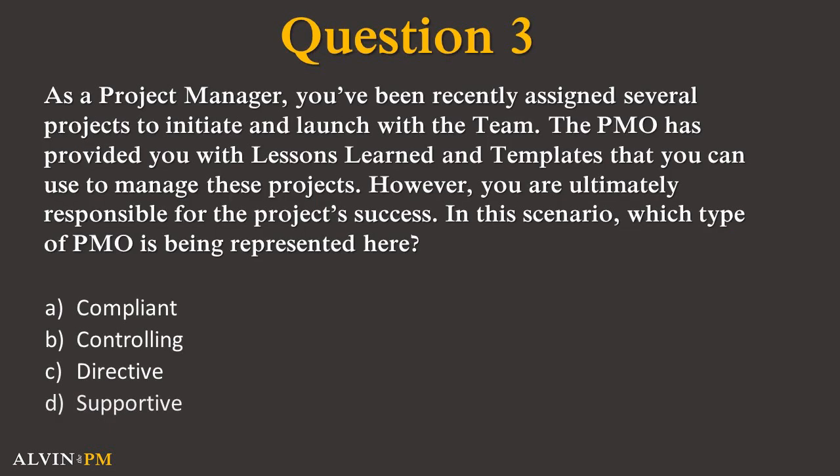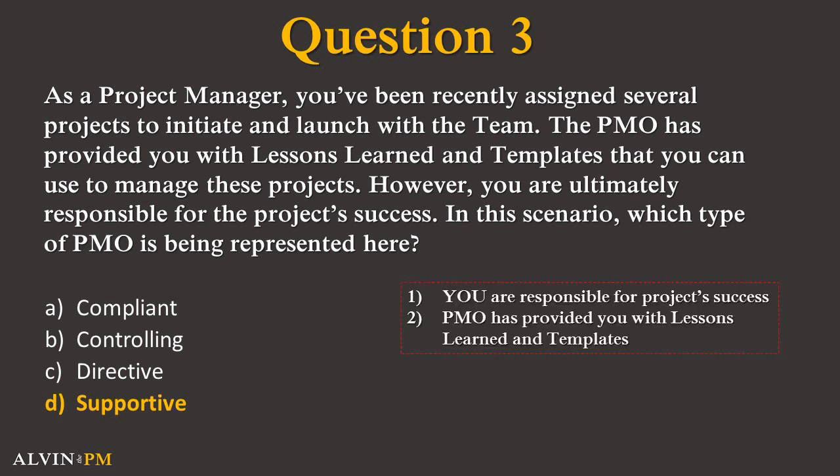Question 3. As a project manager, you've been recently assigned several projects to initiate and launch with the team. The PMO has provided you with lessons learned and templates that you can use to manage these projects. However, you are ultimately responsible for the project's success. In this scenario, which type of PMO is represented here? Is it A. Compliant, B. Controlling, C. Directive, or D. Supportive? The correct answer is D. Because the PMO is not responsible for the success of the project, but still provides support in the form of lessons learned and templates, this is an example of a supportive PMO.